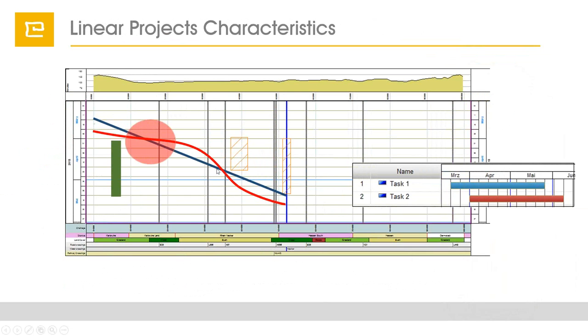So we have two clashes where the red line crosses the other, and we have to move the rate down. For this case, we use so-called distance links, which keep the activities at a certain distance from each other and maintain this over the whole length of the task.